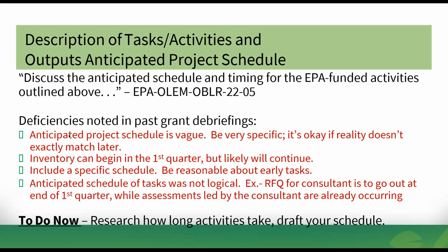Include a specific schedule, be reasonable about early tasks. Here was an example: they said we're going to put the RFQ for the consultant out at the end of the first quarter, but they're also saying the assessments led by the consultant are already occurring. That isn't logical and it would confuse a reviewer. So, to do now: research how long activities take. Draft your schedule. Next slide, please.